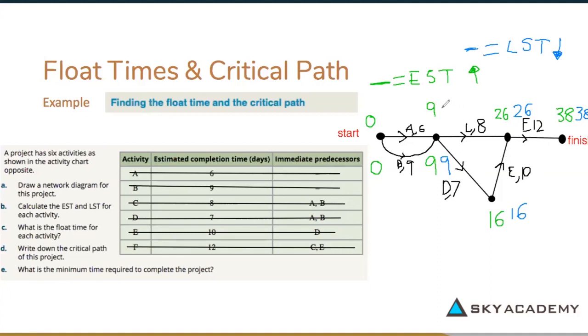Then we can do 9 here minus 9 there to give us 0. And then we'd have 18 minus 6, oh no, we can do 9 because that's the node. So 9 minus 6 would give us 3. Because remember, when you get to here, you can use this box up there or this one down here, and you want to use the smallest one. So that's why we use the 9 minus 6 to 3, not the 18 minus 6.